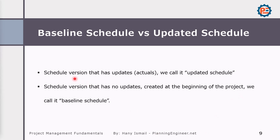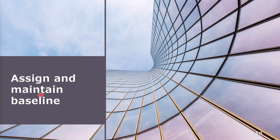A schedule version that has updates is called the actual or updated schedule. A schedule version with no updates, created at the beginning of the project or a phase, is called the baseline schedule. We cannot change anything in the baseline schedule — we always keep comparing actuals to the baseline. In order to do this in Primavera, we need to assign and maintain the baseline.